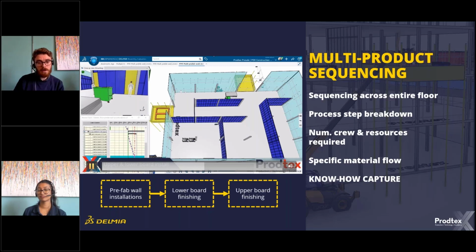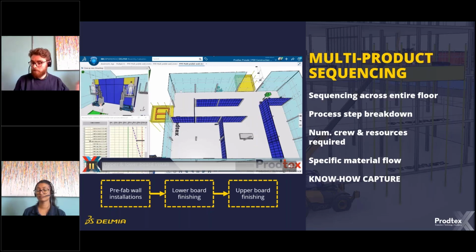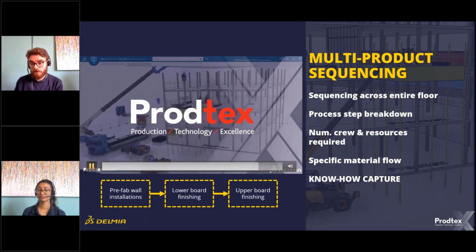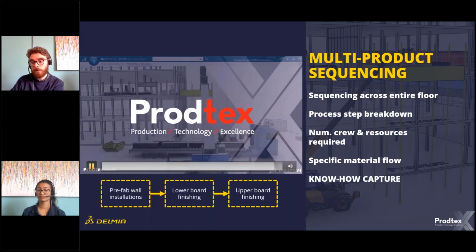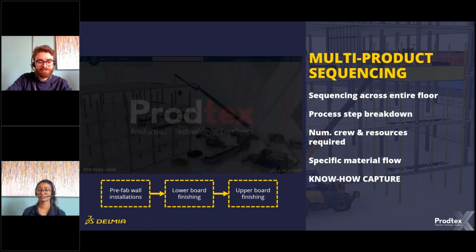The way we would do this, looking at the high level, is, well, actually, because we're moving massive products here, what we want to do is probably start in the bottom right-hand corner and work our way out. So we're working back to the loading bay. So by doing this, we start to find some tips and tricks that we can take forward with us, capture in the business, and take for when we deploy this for real on the next project.